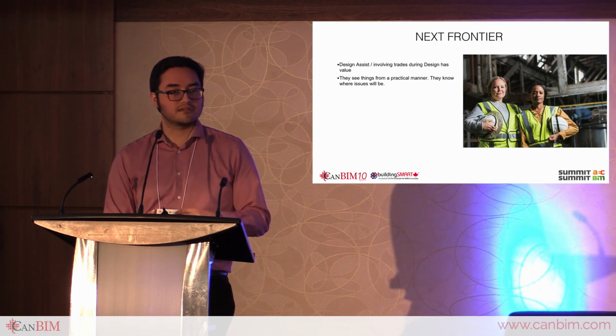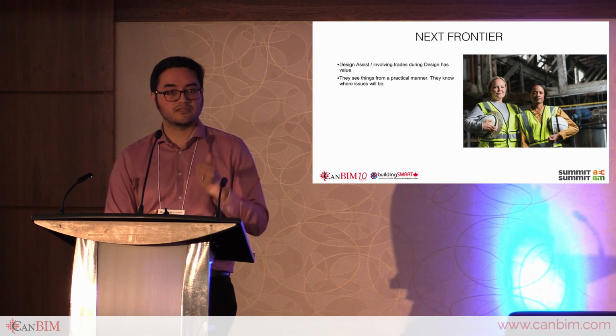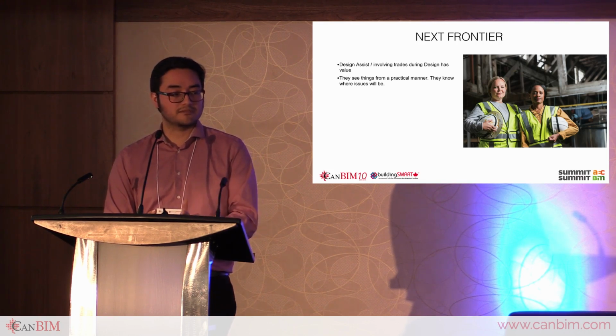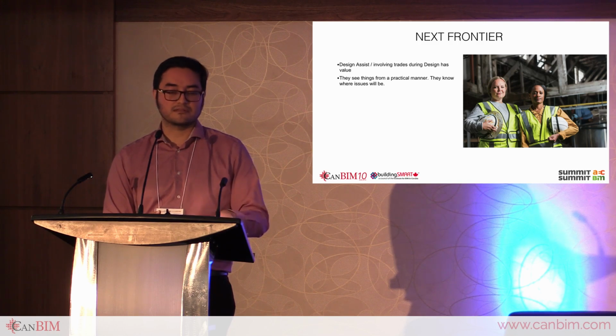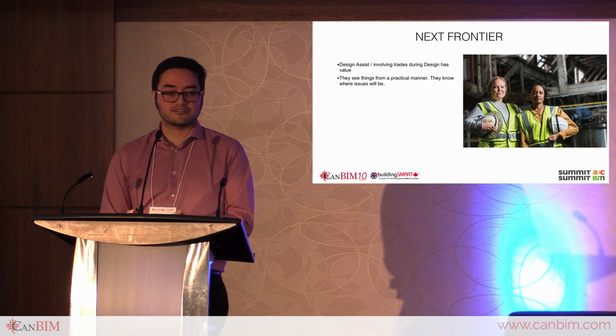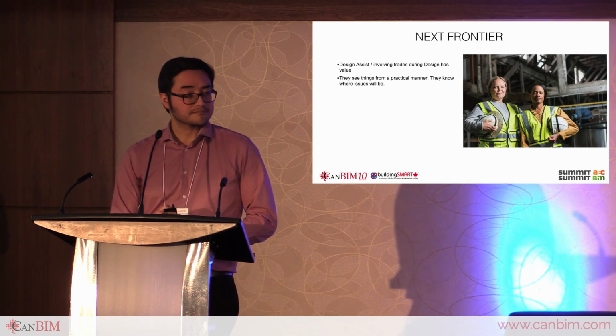So they don't understand the nuances and complications of scheduling, of the fact that you have to support the pipes, right? Either from the floor or from the ceiling. Those things can matter quite a bit once you get into construction. So having trades involved early on is money that is very well spent, because it can prevent a whole series of rework once you move from design to construction and find that, well, these things weren't accounted for.